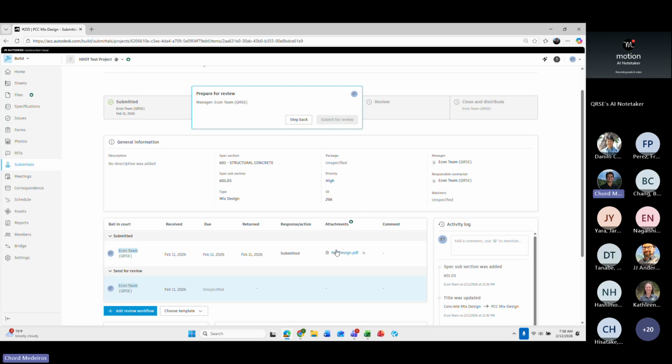But a couple of things that we still need to look for, that we need in JC cards, and this is probably something that you've heard over and over again, is pay items. Because when we're doing material certification in Headlight at the end of the project, if we're not tying this example mix design to those applicable pay items in Headlight, then it will not show up on your material certification document. You need to make sure that any work the contractor does with this mix applies to those pay items that they are submitting for acceptance or approval. And those pay items are very, very, very important.